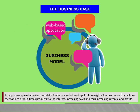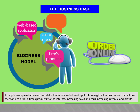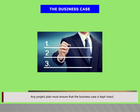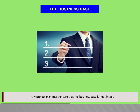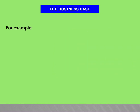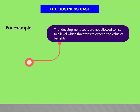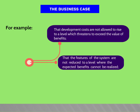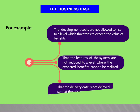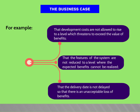A simple example of a business model is that a new web-based application might allow customers from all over the world to order a firm's product via the internet, increasing sales and thus revenue and profits. Any project plan must ensure that the business case is kept intact — that development costs are not allowed to raise to a level that threatens to exceed the value of benefits, that the features of the system are not reduced so that expected benefits cannot be realized, and that the delivery date is not delayed causing an unacceptable loss of benefits.